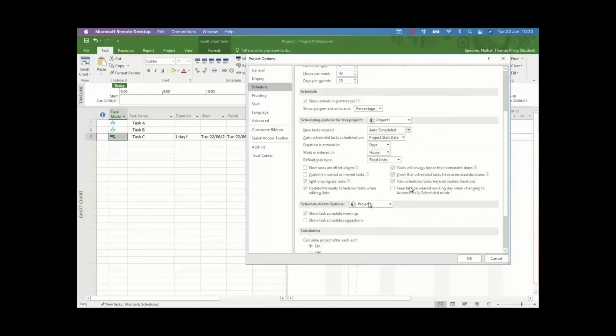Carrying on, when we're looking at scheduling again, as you will probably be aware, there are two key options. We've got smoothing, which enables your duration to stay the same, but you just optimize your resource utilization. Or you've got leveling, which is only usually conducted after smoothing can't optimize the resource any further, which causes the duration of the project to be extended.